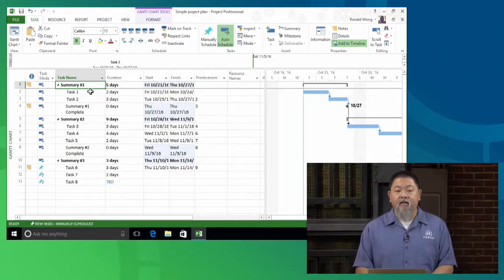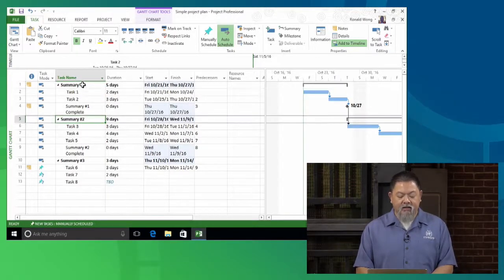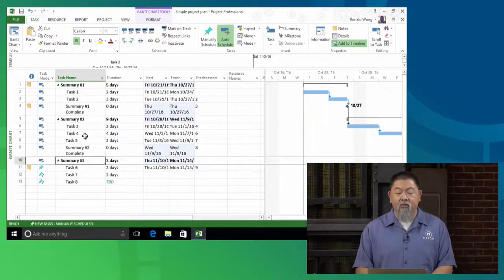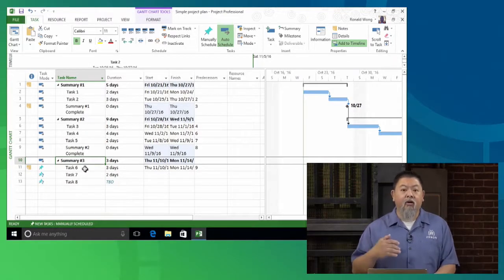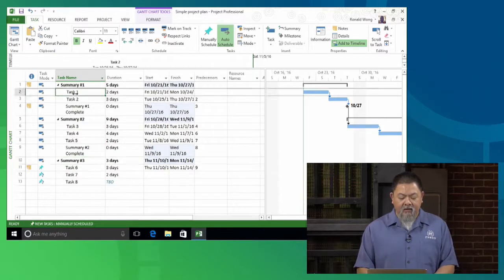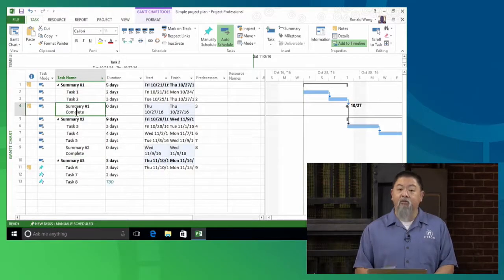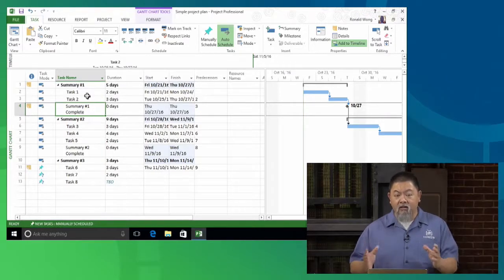But it allows us to make entries such as our task. Now, summary task 1 and 2 and 3, normally this would be our second level or our top level breakdown of our WBS that we might enter in there. And then these other tasks that are indented in between normally become our subtasks, okay? In other words, that smaller WBS package, the work package that we have.